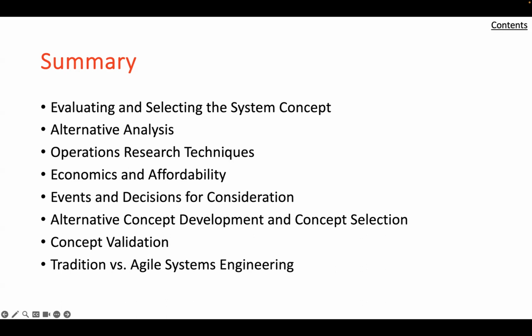Justification for the development of the selected concept should show the validity of the needs to be met, state reasons for selecting the concept over the alternatives, describe the program risk and means for containment, give evidence of detailed plans such as a WBS, SEMP, and so on, give evidence of previous experience and successes, present lifecycle costing, and cover other relevant issues such as environment and impact.